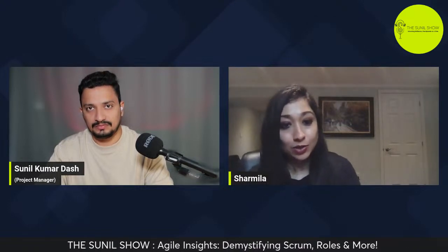Now, based on the availability of the development team, we also have to take into consideration the experience of the development team. Some can be new developers, some can be experienced developers. So the time that an experienced developer will take to develop a particular user story might be very different from the time a new developer will take to do that same work, in terms of user story estimation as well as capacity planning. It's very important to take into consideration important factors like the amount of effort needed to deliver that particular story, the complexity involved in developing it, as well as the risks associated with it.